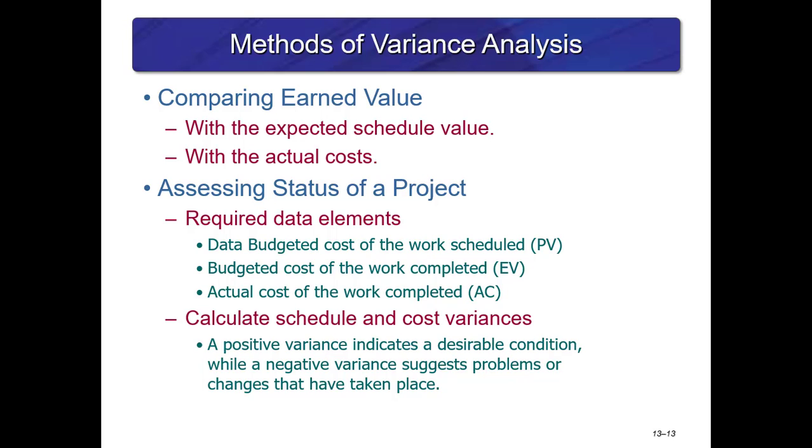So also remember that when you create your baseline schedule, if you have a change order or change in scope that is approved by your client and your project manager and sponsor, then you have to redo a baseline. So you have a new baseline to measure your project progress against.